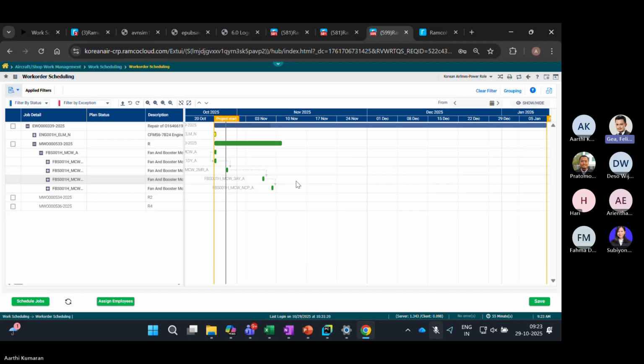That is where the first question you asked comes in: you apply the constraint, because you have limited manpower, or limited parts are not available, because that particular task is on hold since you don't have parts or you don't have tooling. These are the three constraints.